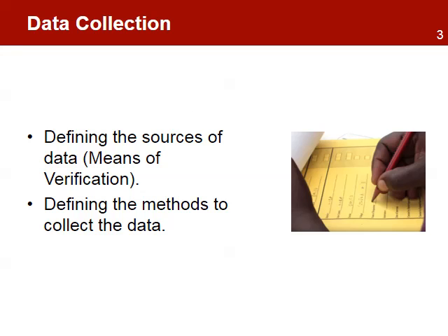Data collection deals with the sources of data and the methods to collect the data for each indicator identified in the performance framework matrix. In this step, the project manager also needs to consider the frequency of the data collection, the people who will be responsible for data collection, and the resources needed to collect the data.